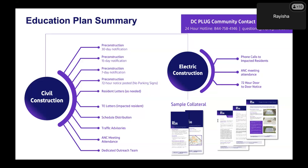Once we begin the education plan around the pre-construction phase, we do a 30-day notification, a 15-day notification, and a 7-day notification door-to-door to all impacted residents — you'll receive a door hanger at least three times. We also host a pre-construction meeting, inviting everyone who attended tonight as well as conducting door-to-door outreach with that information. Resident letters are sent as needed — for example, if a sidewalk will be closed — and those who received transformer enclosure packets during design will receive letters again during construction.